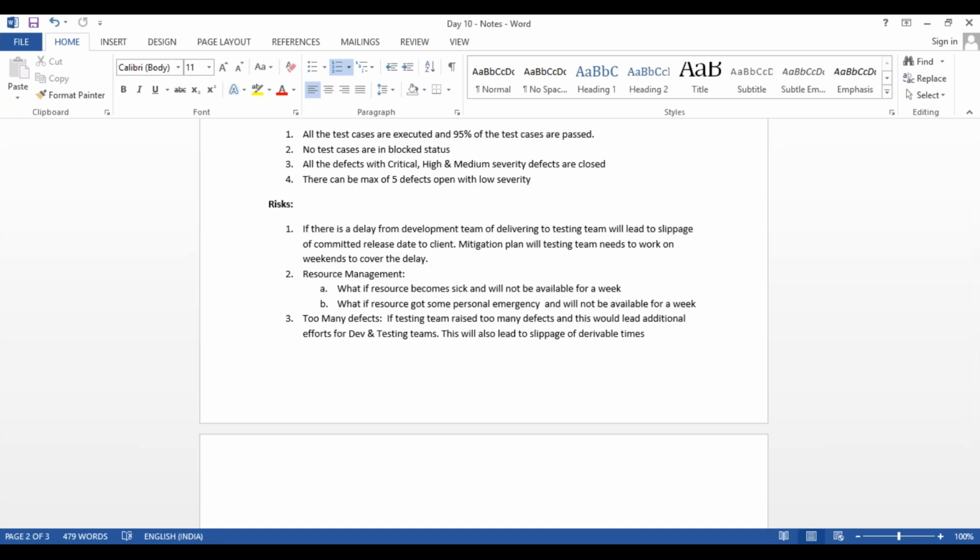Now what did we consider? It's a total 1 year project. Out of 1 year, 9 months are given to the development team, architecture, and all the stuff. But 3 months we estimated for testing, where the testing team will take October, November, and December. These are the 3 months we are planning to take.